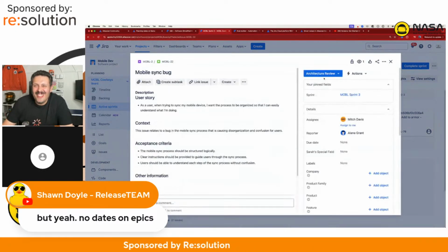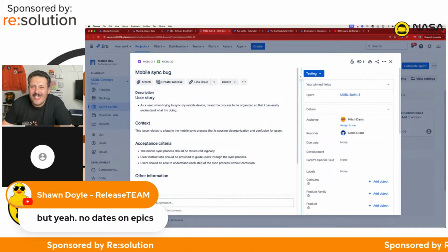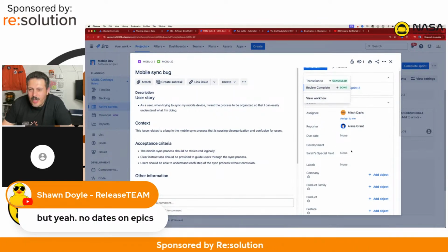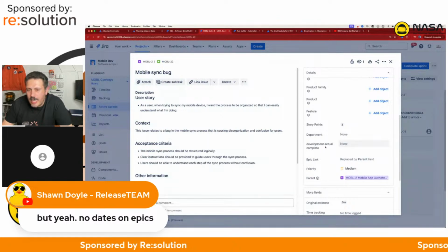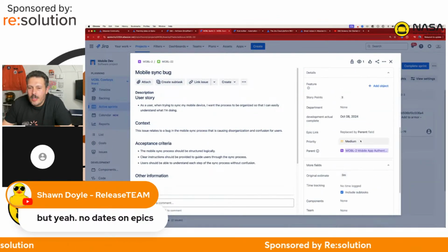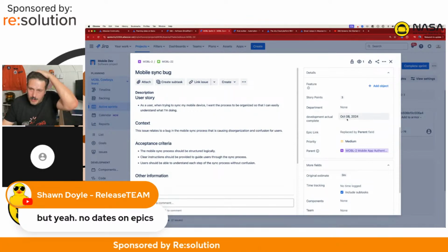Now when you move an issue from here to, oops, that went to cancel. Now, see, I have like the most messed up workflow. Okay, so we've got to go to testing, then in progress, in review. Now when we go to done, watch, you'll see that my development actual is not set. But when I go to done, it will set it. So there's a date. And obviously, if I did the date timestamp, you'd have that too.